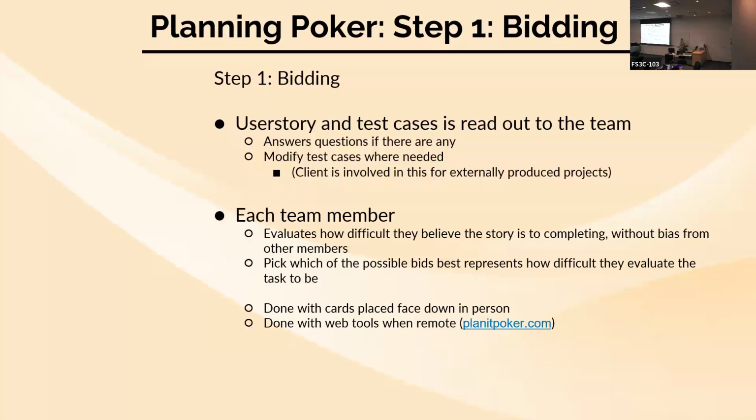Each team member will then identify how difficult they think it is to complete from the possible bids in front of themselves. This can be done with playing cards face down, or it can be done with web tools like planitpoker.com. Actually, here in my backpack, I have these cards.